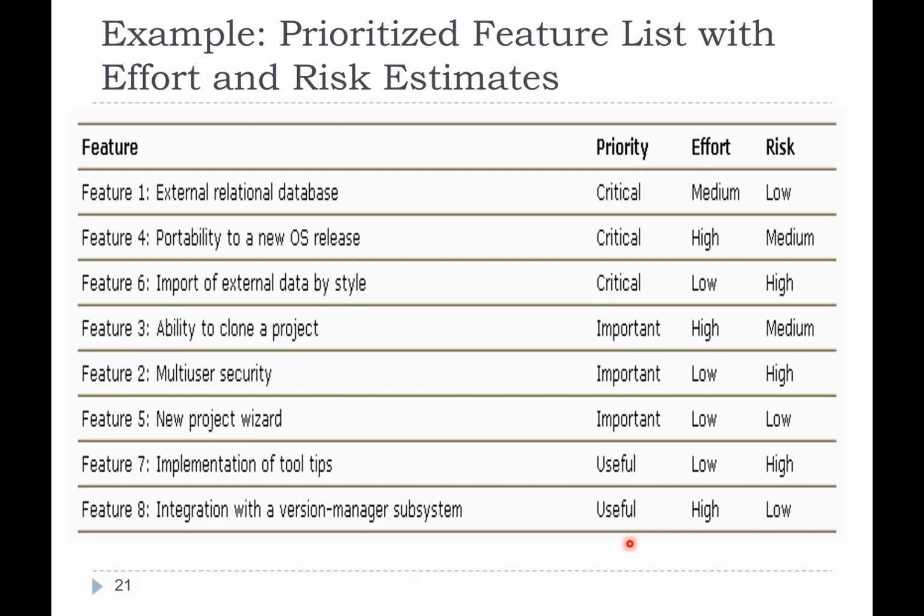The other one, the effort. How much effort? Even if it's important, but it's really, really high effort, then maybe I'll leave that until post development. If it is very low effort, very low risk, but it's not really that important, again, I might want to leave that until, or I might keep it. Again, it's a gray area. So just to sum up, yes.